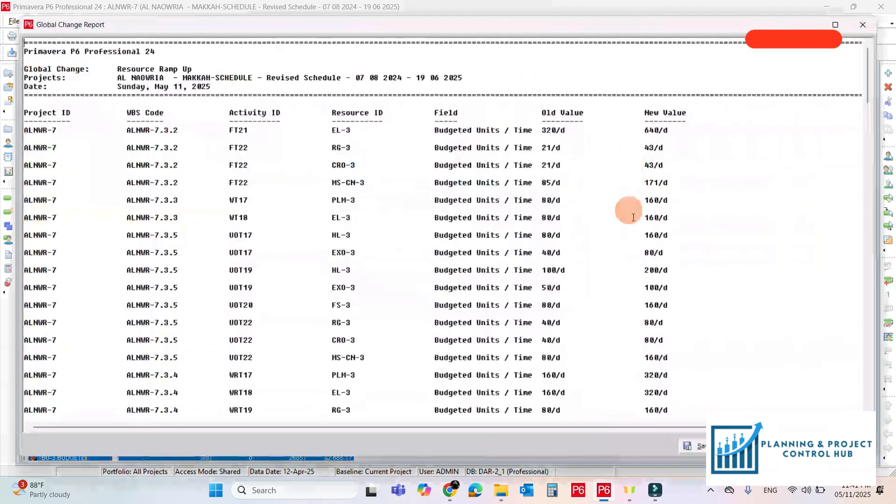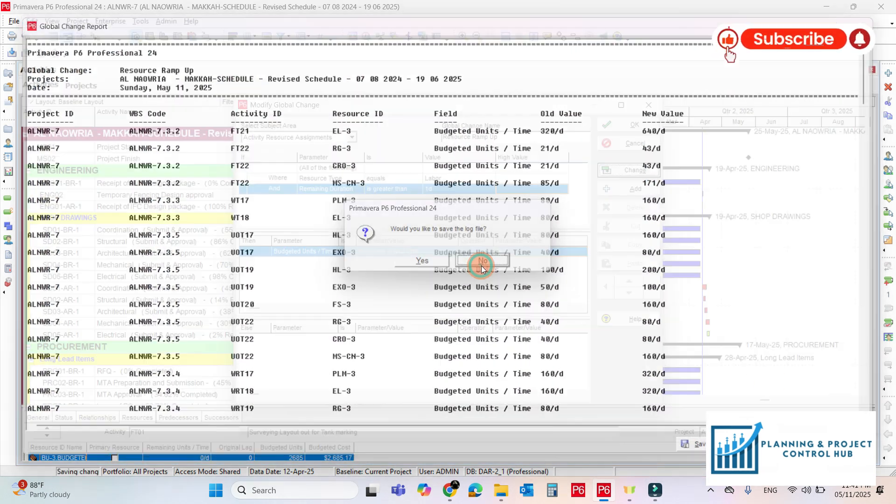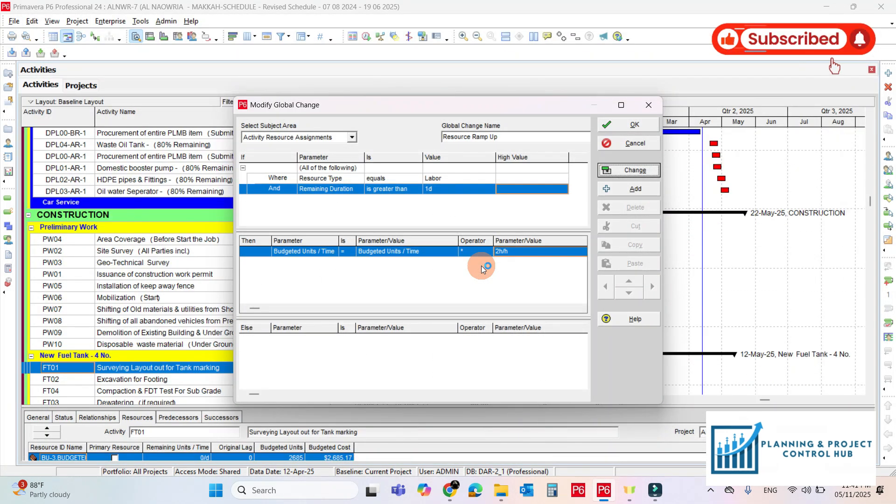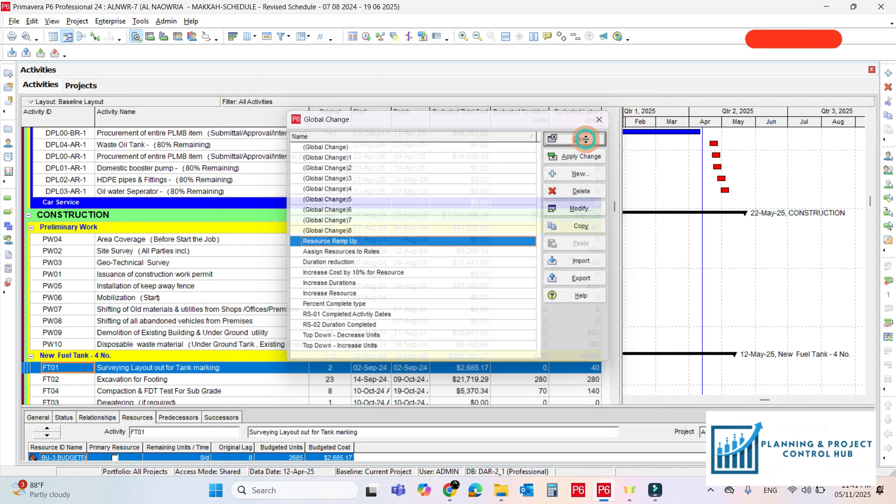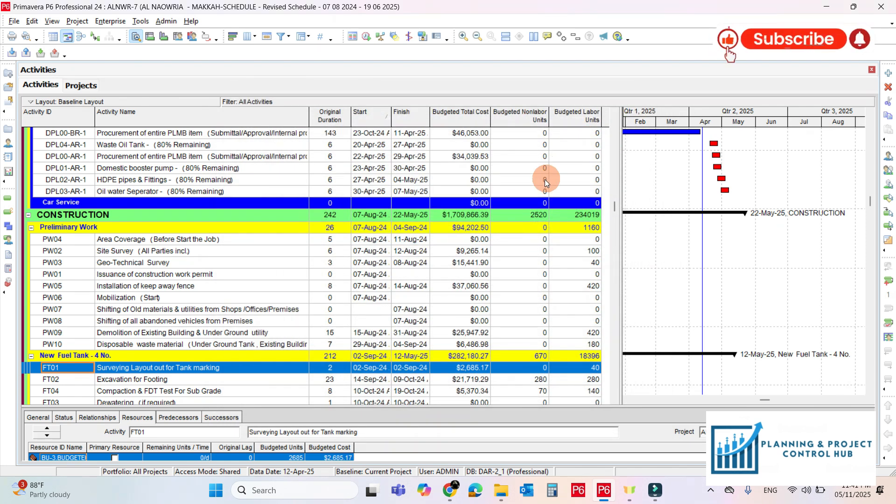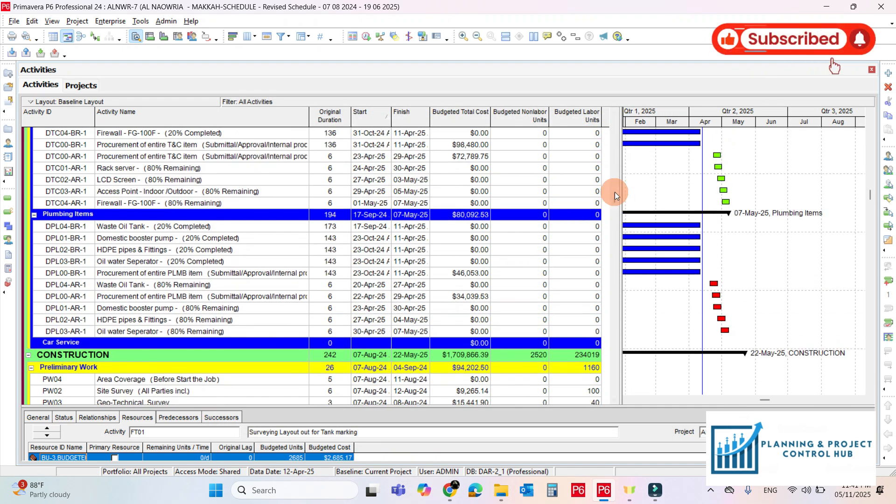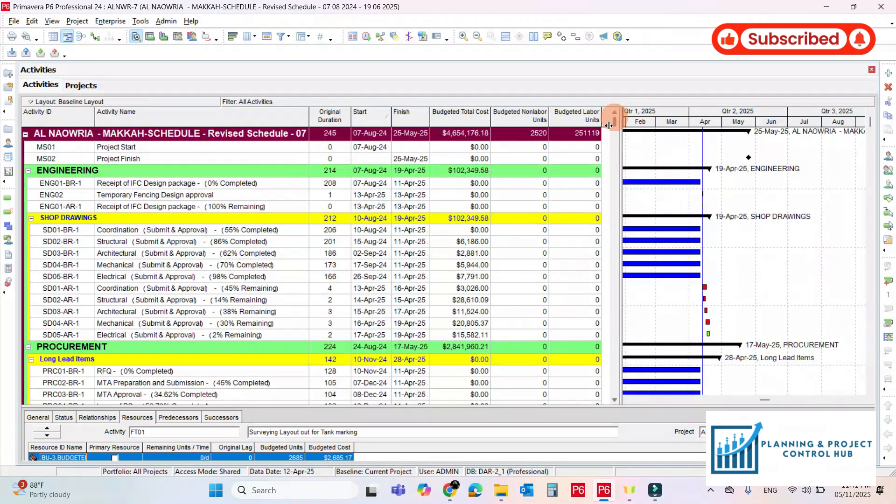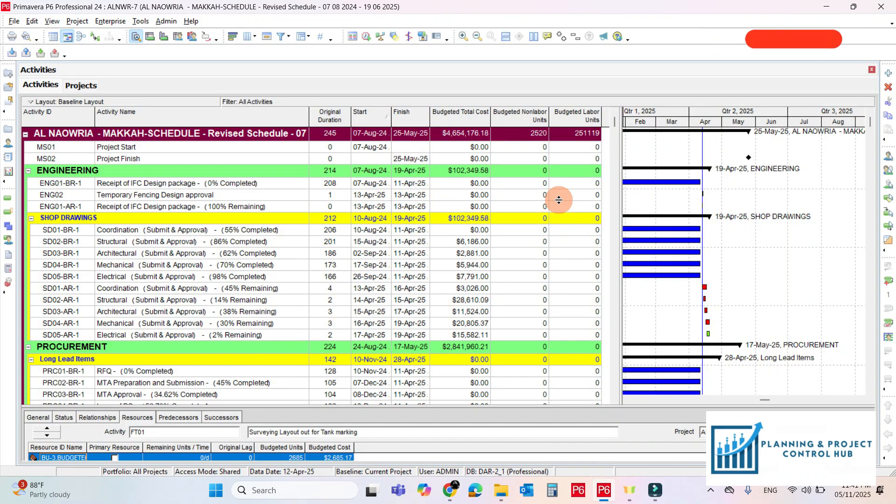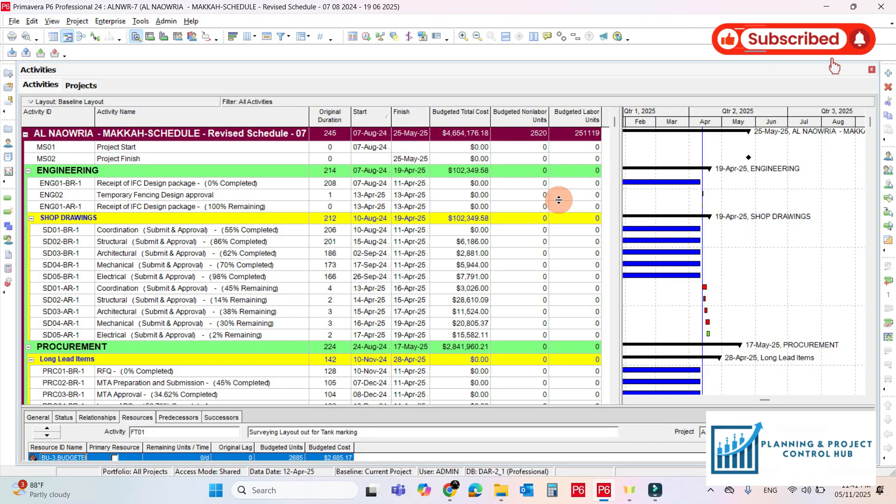As we reduce the duration by 2, so we have to ramp up the resources by 2. Do changes. Commit changes. No need to save the log file. So it's already done. Okay. So our resource has been ramped up. So by this way using the global change function we can do many changes just in a few steps.